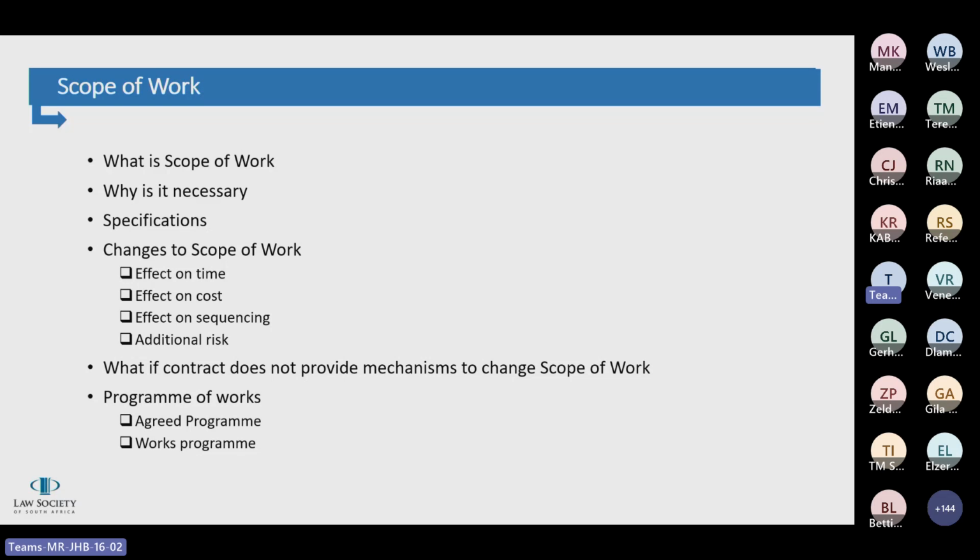And then we've got proprietary specifications, which is often used for a single type of project or any kind of installation or job involving existing equipment and already completed installation. So that's where your scope of work has to fit in with existing equipment and installations. So specifications are included to ensure that the contract builds the deliverable according to specified materials, finishes, and standards. This obviously enables everyone to understand and to ensure that what is built ultimately will be fit for purpose. It details the work, the workmanship, and the methodology of work, as well as the quality that will ultimately be required.